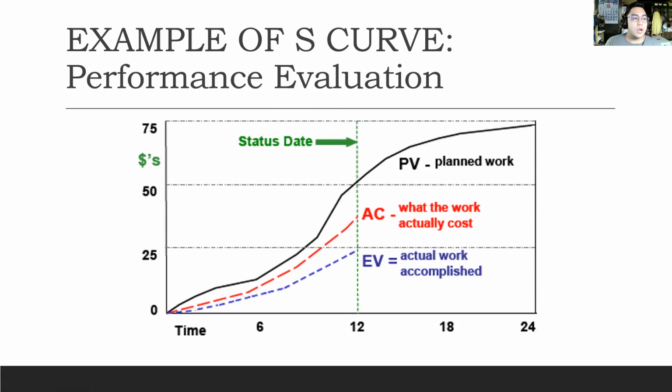This means our earned value and actual costs are below what we had planned, which could mean our schedule and budget at completion were not well forecasted, or that the project has run into some issues. In this S-curve example, early signs are that project activity and progress have not scaled as quickly as planned, which could be a result of daily production rates, a specific delay, or something else.